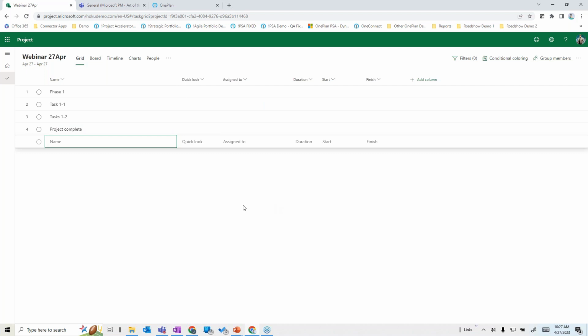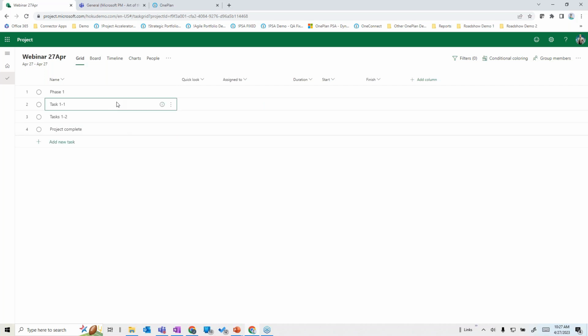And the idea here is that you can quickly build these things, and you can even build your hierarchy here, where, for example, I could say, let me select these 2 tasks, and let me say I want to make these subtasks of the overall project, and I can start indenting and outdenting tasks and do those types of things. I can even just simply say, what's the duration of these tasks? And I can come in and say, let's just say 5 days. And then I can come in here and say this next one is 10 days, etc. And it's automatically putting those days in here.